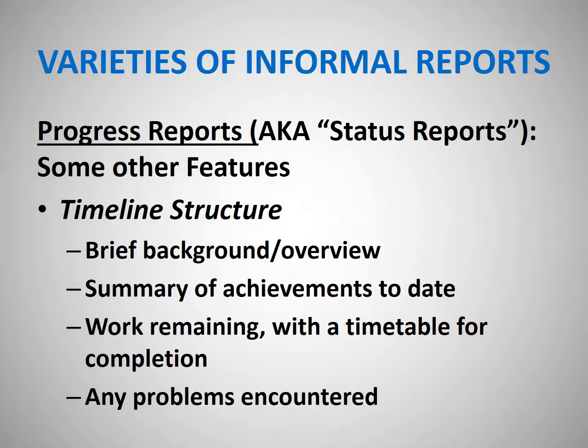That's the work we still have to do, with a timetable for completion. And then, at the end, any problems encountered. So you start with the good news. Tell me what's already been done. Then, what needs to still be done. And, have we run into any obstacles along the way? That's the major structure of a progress report in memo form.